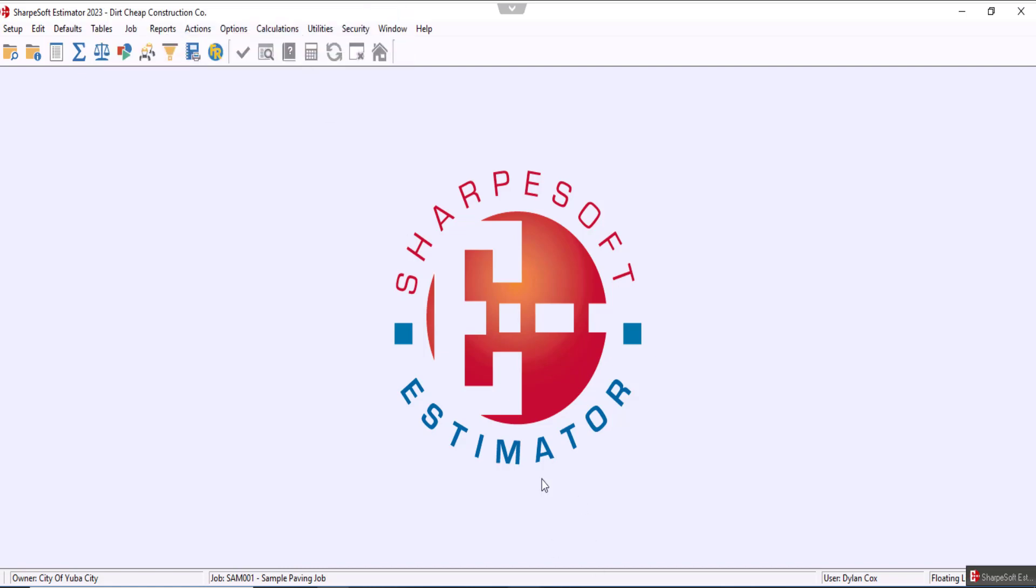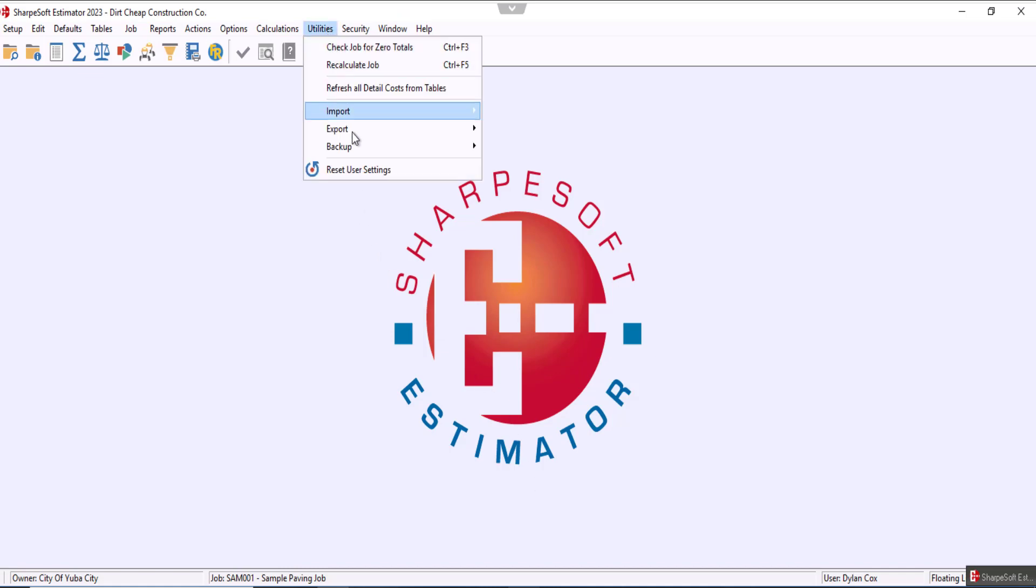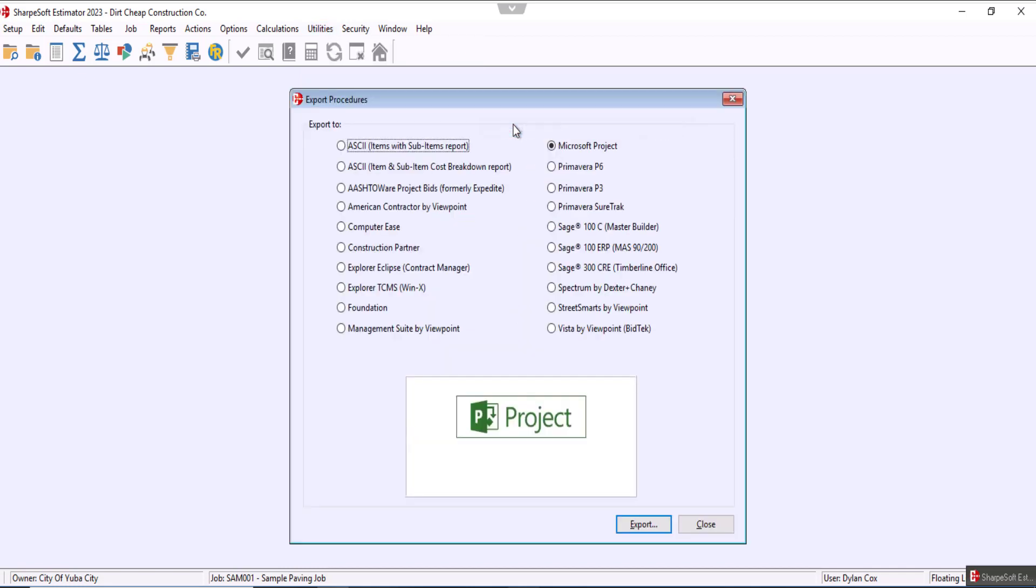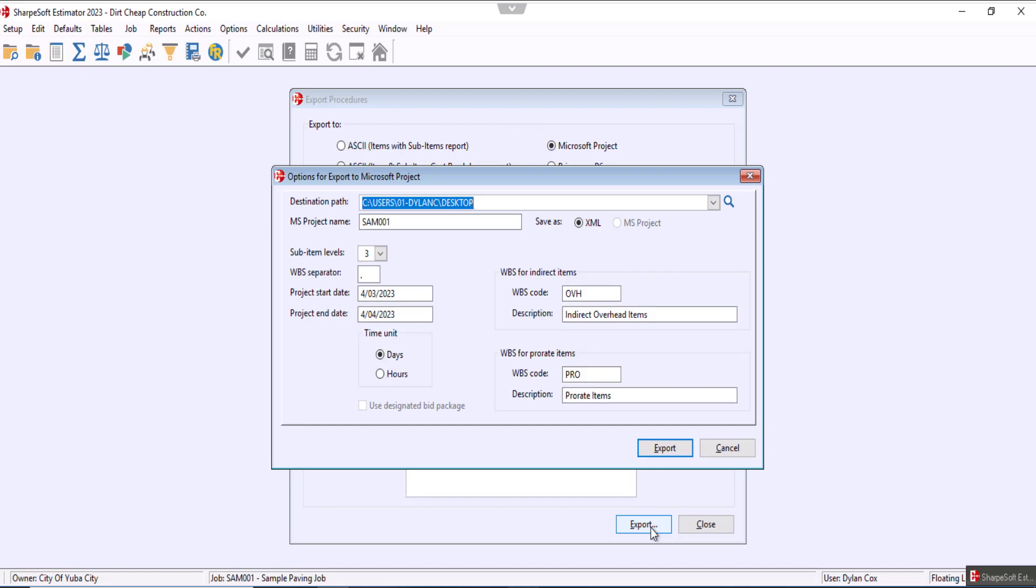Now what we're going to do first is come up to utilities, go to export, export procedures, make sure we have Microsoft Project selected, and click export.